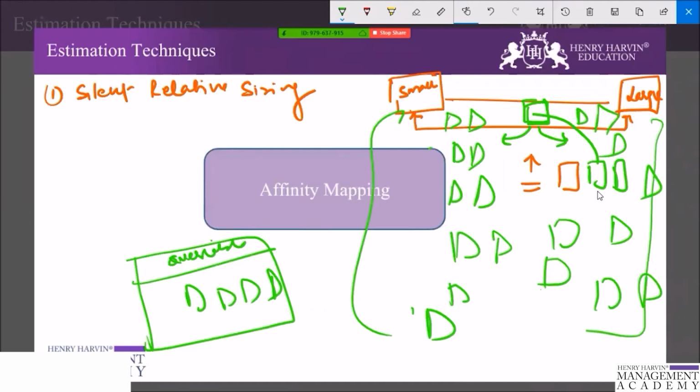So when the time comes to edit the relative sizing of the wall, you can ask team members to read the product backlog items on the wall and move them around as needed in direction, smaller or larger. Explain to the team that we should be considerate of the other team members' estimates and therefore bring others into the conversation when appropriate before making the extreme move.